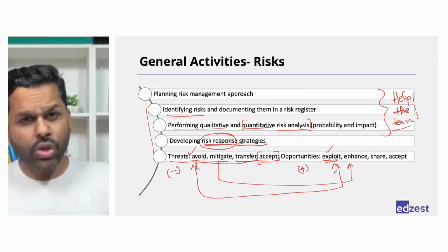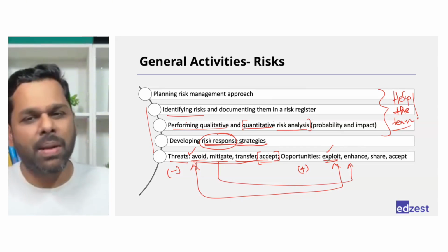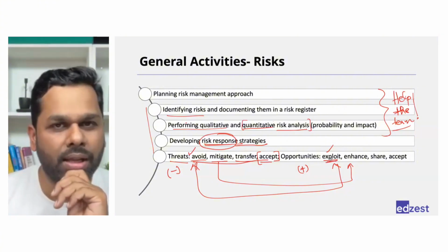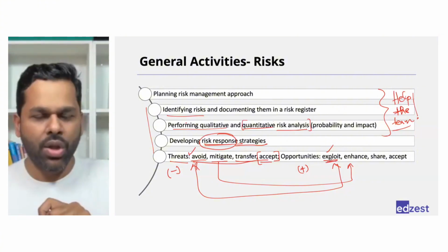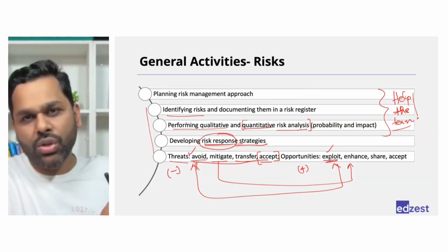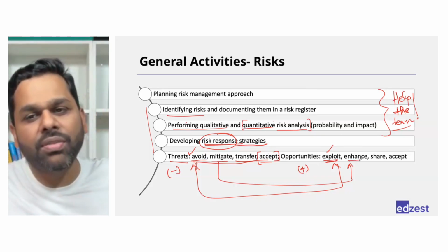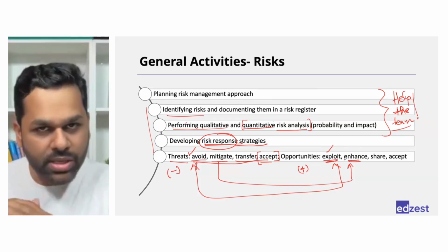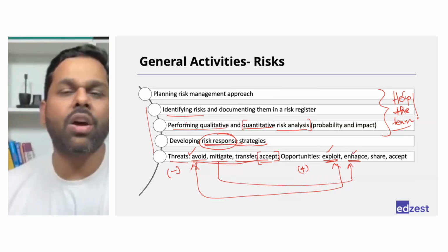Right? So you want to use AI, you cannot change the plan completely, but you said, okay, do we have data to use AI? Let us capture data as well. So you said we will capture more data, we will store it somewhere so that we can enhance our chances of utilizing AI and utilizing the benefits of AI. By doing something extra, you are enhancing the opportunities.